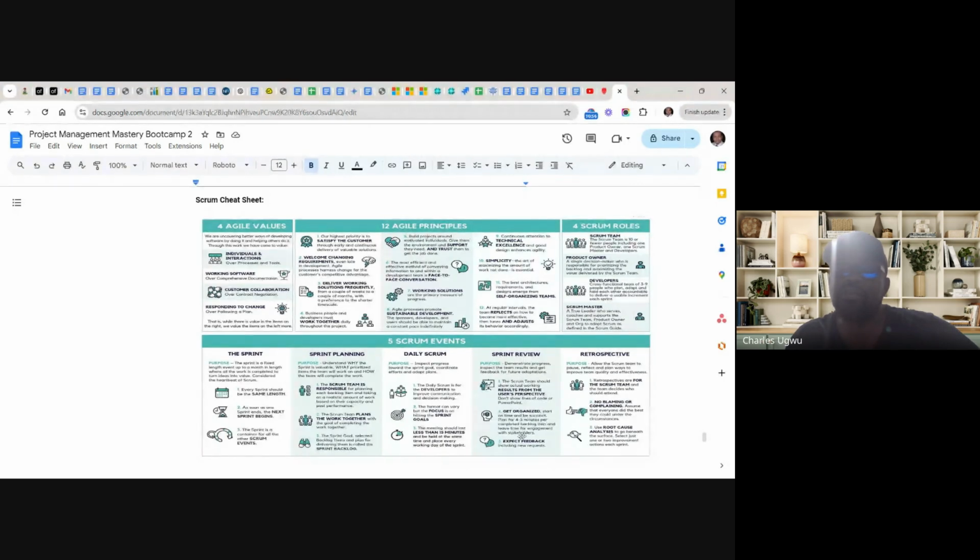So before this, you must have created a test plan that the users are going to use to do the testing. It's part of what we are going to do in business analysis. And then after all the testing, expect feedback from the stakeholders. The stakeholders must give their feedback that the team needs to work on. So that is the purpose of sprint review. You demo what you've done and then you wait for the stakeholders to give their feedback.